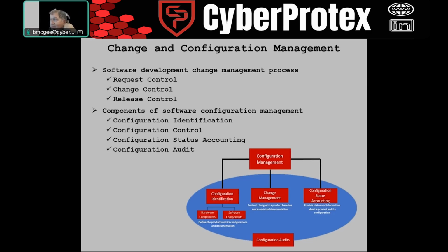So they would always just say, take whatever the estimate is and let's multiply it by pi and give it to the customer. And the customer would always approve it. Yeah, you're right, Shmaria. That's what we try to do. You double it personally. I know a lot of construction contractors will double it. By doing that, in my head, I can count probably on one hand the times that we have not been able to deliver by doing an estimate.